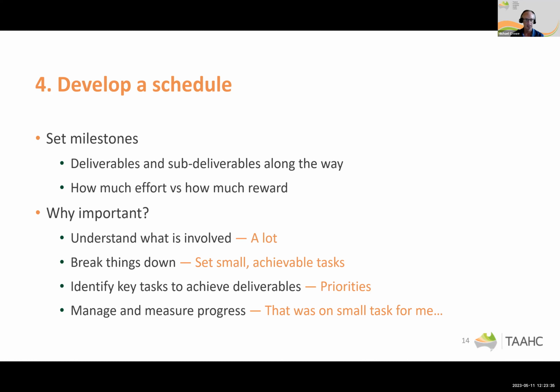Putting together a schedule like this also gives you a better understanding of what exactly is involved and all the steps that are involved for the research. So breaking things down into smaller and smaller achievable tasks. You've got your deliverables, you've got your sub-deliverables underneath that, and then each sub-deliverable will have tasks attached to it, which are usually the smallest things. And then you're trying to develop your schedule around those tasks and figuring out how many tasks are required to meet a sub-deliverable, and then putting all those sub-deliverables together to meet the deliverable.